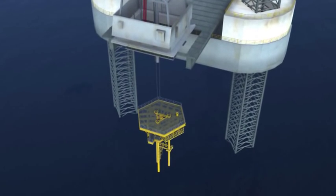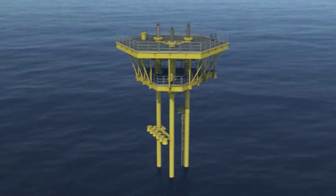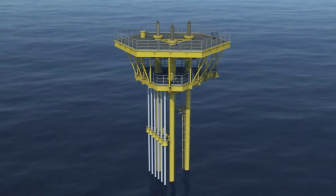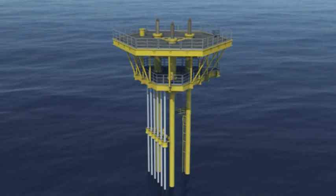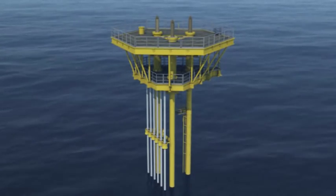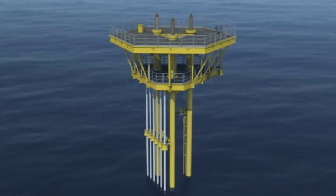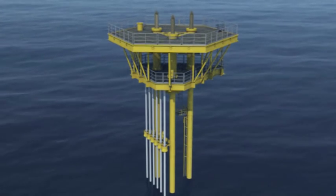From transfer to land-out and secure, the whole process takes only about six hours. The jack-up is also used to install the export risers and I-tubes, a speedy process which requires no special handling equipment — each one is fitted in approximately six hours. When this work has been completed, the rig is released to continue drilling the wells through the conductors via the topside section.